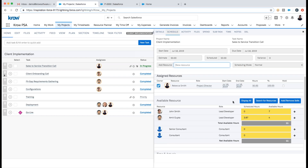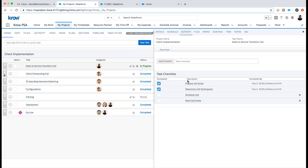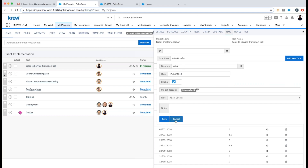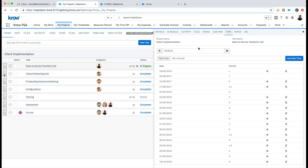I can also manage checklist items for this task and configure the system so that percentage complete is driven by checklist completion. I can enter time directly from the task — either manually entering time worked, or starting a timer. I can log out of the application, come back, pause the timer if on break, or stop and save. All of this time and expense management, including project management, is available from a mobile device as well.